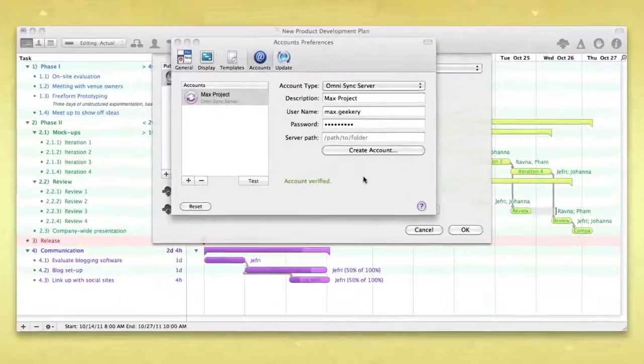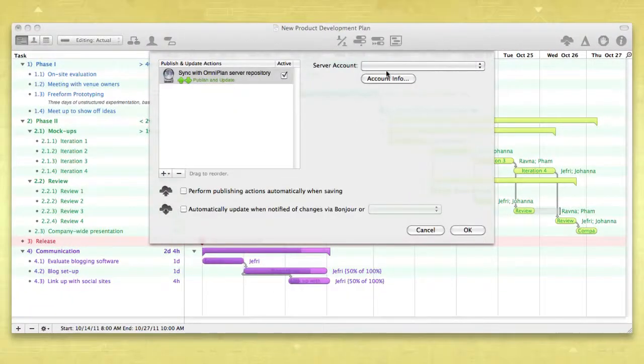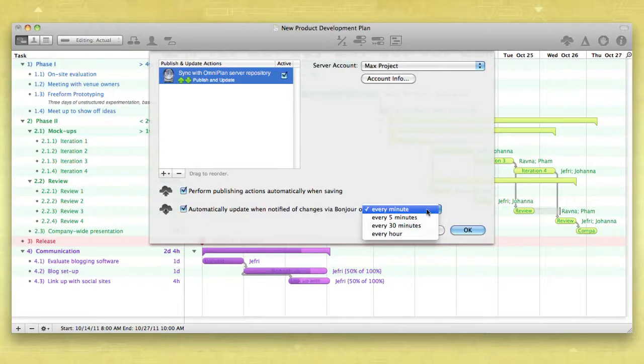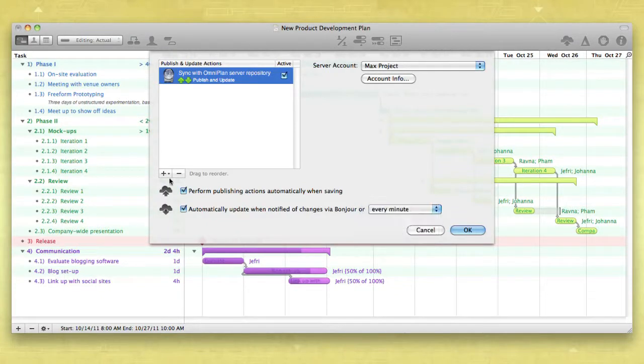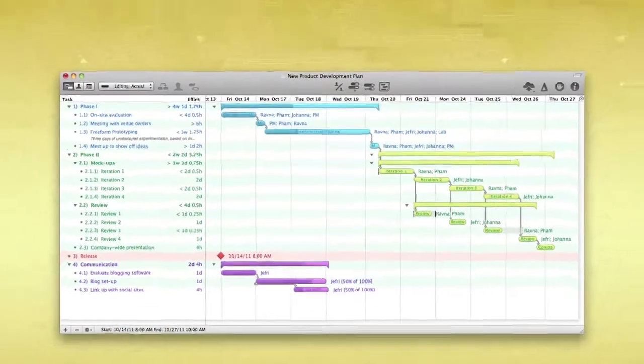Now, choose whether you'd like to publish changes and receive updates automatically. Or, leave those items unchecked and sync manually by choosing Publish or Update from the Project menu.